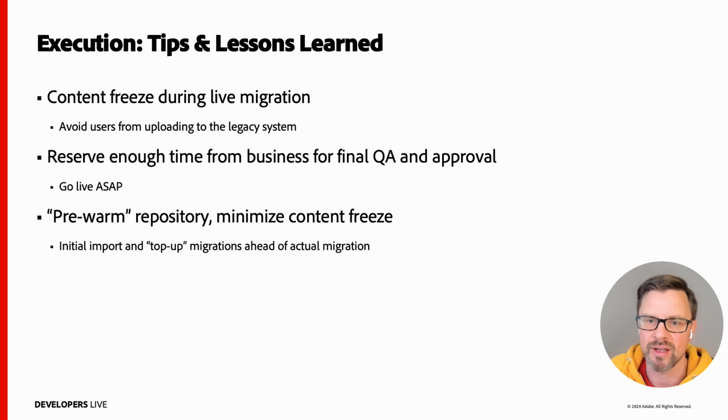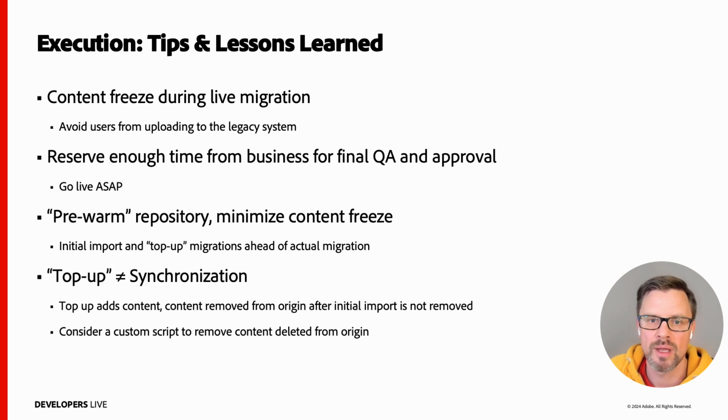If you have a large volume of data and a small content freeze window, consider doing an initial import of the binary data early in the project. In the actual live migration, you would only have to transfer the new assets as a top-up.